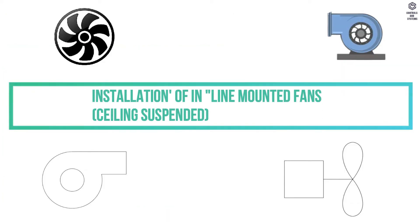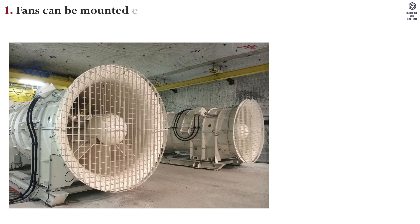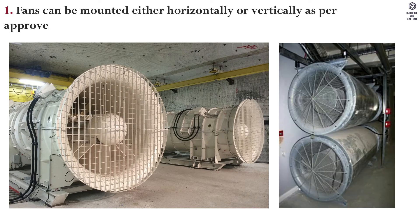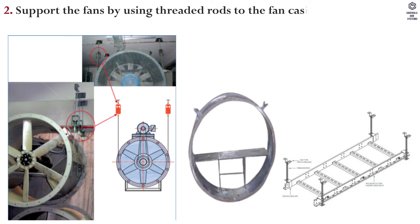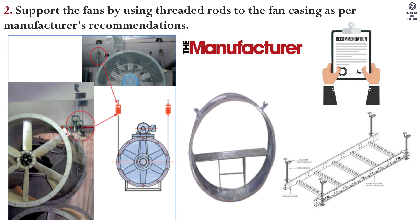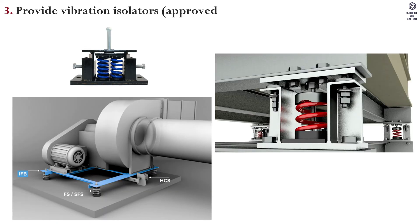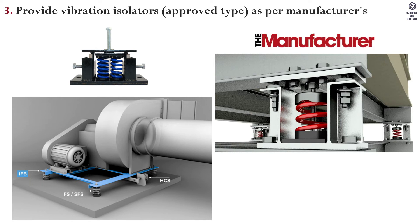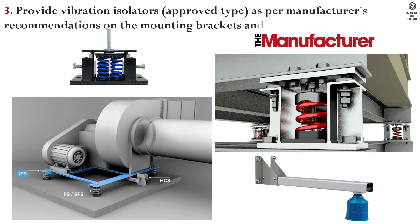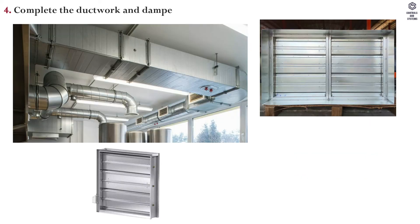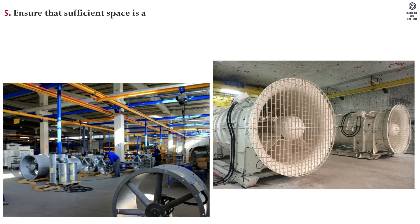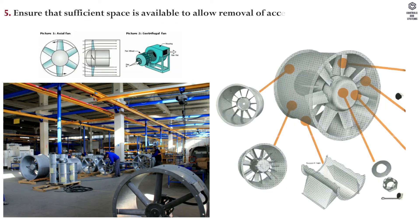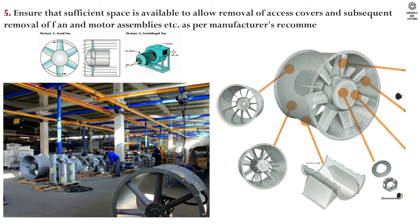Installation of inline mounted fans: 1. Fans can be mounted either horizontally or vertically as per approved shop drawing. 2. Support the fans by using threaded rods to the fan casing as per manufacturer's recommendations. 3. Provide vibration isolators of approved type as per manufacturer's recommendations on the mounting brackets. 4. Complete the ductwork and damper connection as per approved shop drawing. 5. Ensure that sufficient space is available to allow removal of access covers and subsequent removal of fan motor assemblies, as per manufacturer's recommendations.